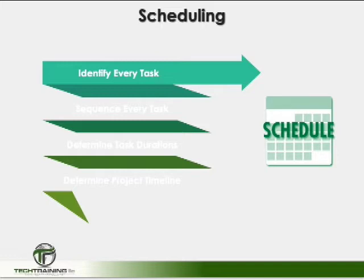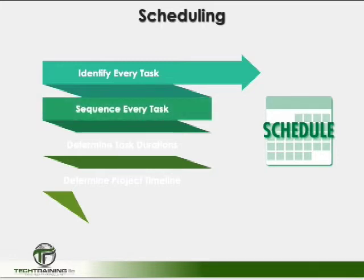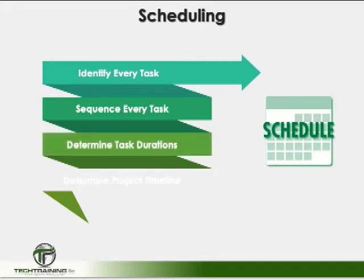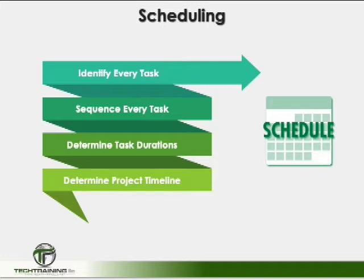For construction, we identify and describe all of the separate tasks that are going to be completed, and we sequence the tasks logically. Once this is completed, the scheduling can be done. Scheduling consists of determining task durations and the overall duration of the project. Putting each task into context and understanding the length of time for individual tasks is crucial to the overall schedule.